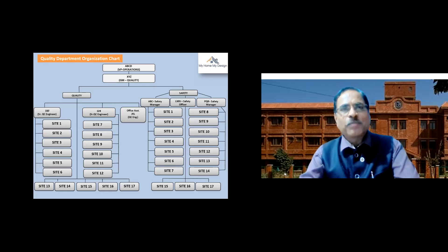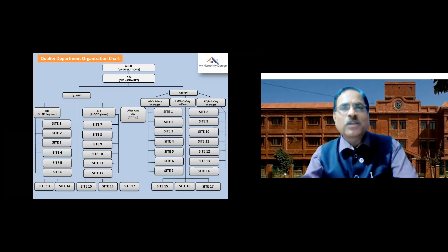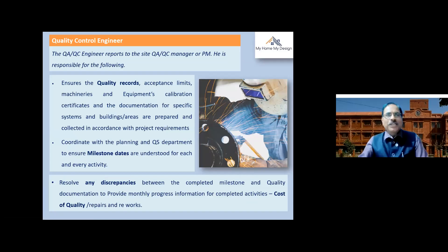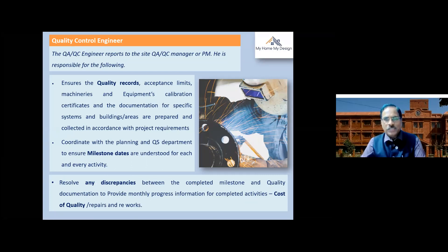This is the quality department organization chart for a standard project. The VP is the operations head, and the quality head reports to the VP, managing both quality and safety organizations. Respective engineers and teams across many sites can be monitored. The role of a quality control engineer is very important — the QC engineer reports to the project manager and is responsible for ensuring quality records and acceptance limits, such as SR minus 1mm, 2mm, 3mm tolerances.